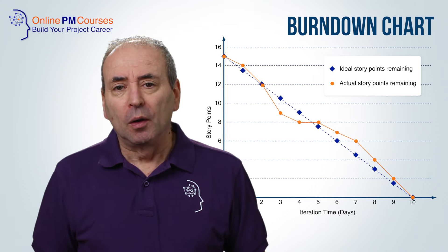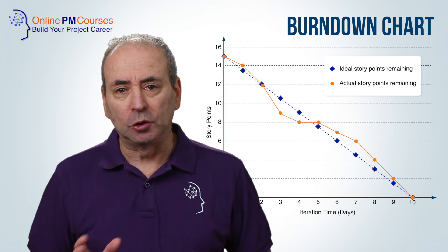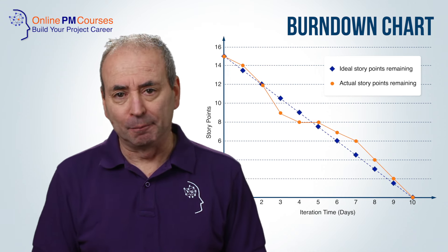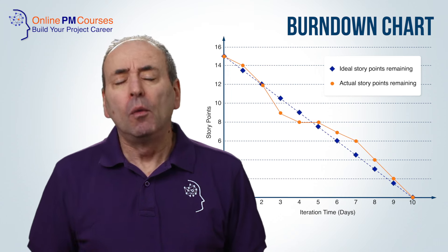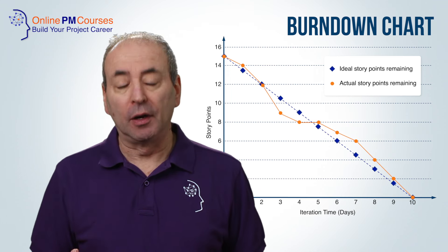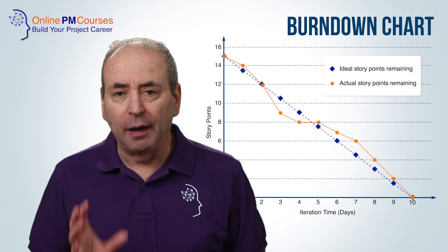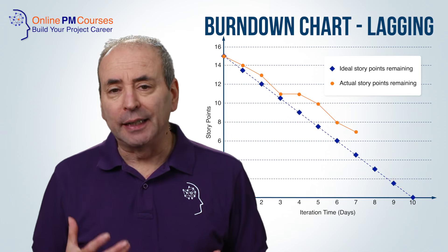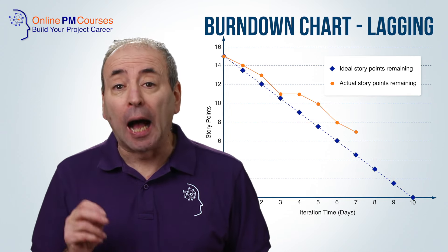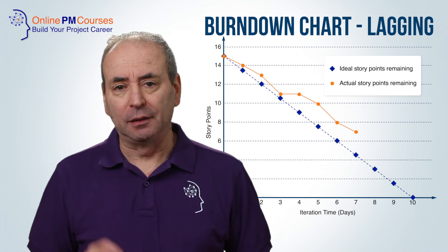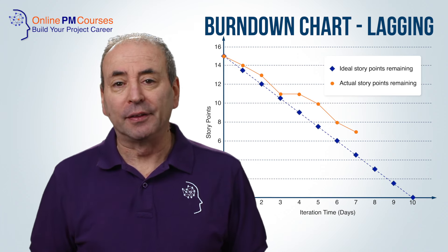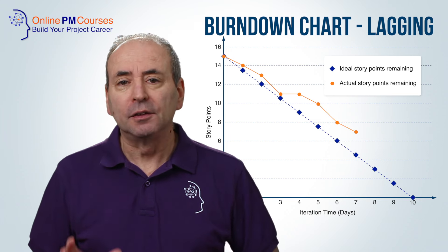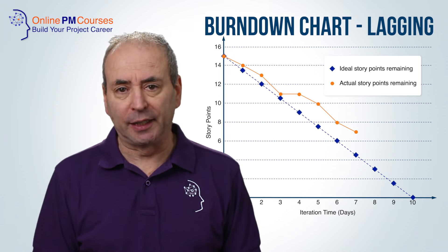Of course, we may not complete a whole story point or finish a story point within a single day. If, when we plot our actual burndown against our ideal or planned burndown rate, we find that the actual burndown curve is above the ideal line, then we know that the project is lagging, and the team has to work hard to find a way to get back on schedule.